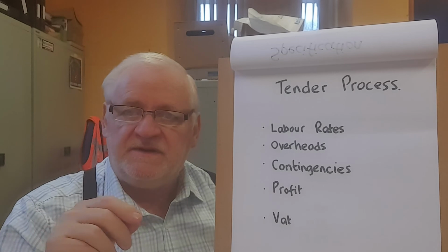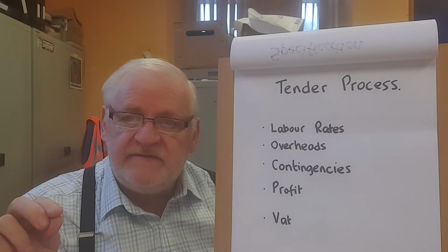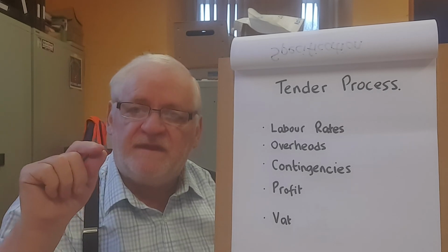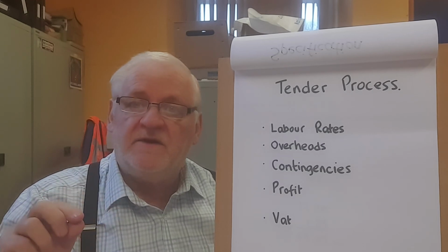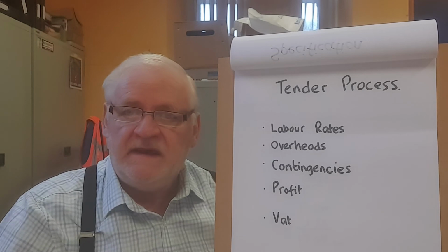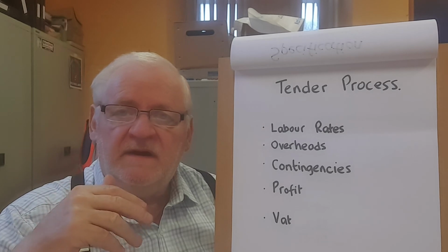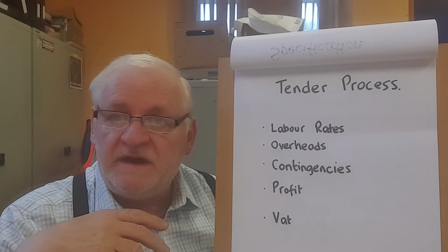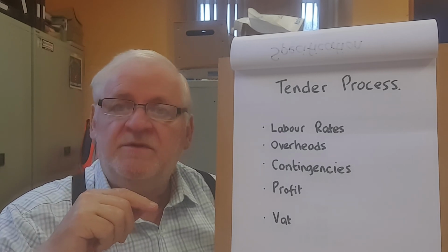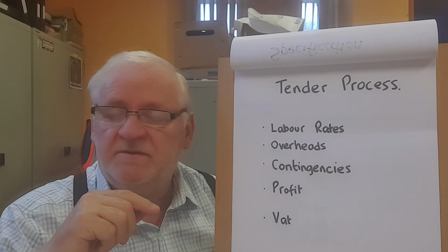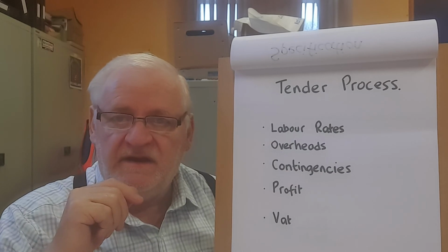So on the variation order, it will all be filled in and the work will be described, and there'll be a price given on the variation order. And then both the customer and the laborer, the worker, the carpenter, will sign to say that they agree to this particular price. Now this guards two things. It guards the customer from having an increase in price without being agreed, and it also protects the carpenter or the builder from not being paid for extra work that was requested to be done. Okay, so the variation order then is very important.